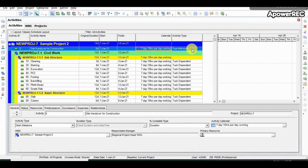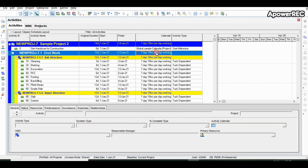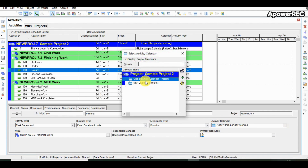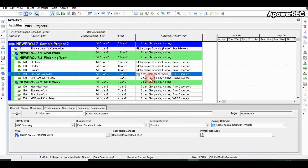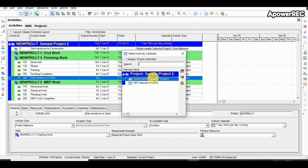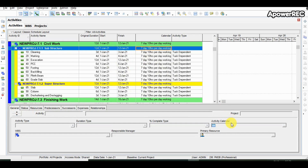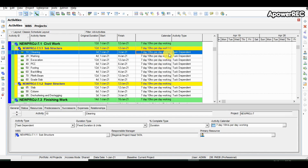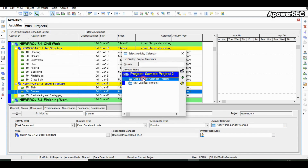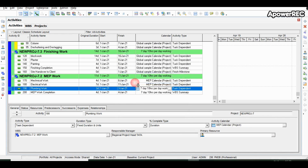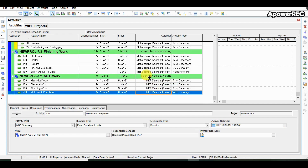This is the first step of defining activities in Primavera. Next we need to change the calendar of each activity. We have changed the calendar to the global sample project calendar. Similarly for all other activities the required calendar can be changed. The calendar plays a very important role because it decides the timeline of the activity based on duration on the Gantt chart. If an activity is 3 days but there is a Saturday/Sunday off in between, it will reflect as 5 days. The calendar can change the entire schedule, so it is very important to define the right calendar. MEP work has Saturday off, which needs to be provided to Primavera.